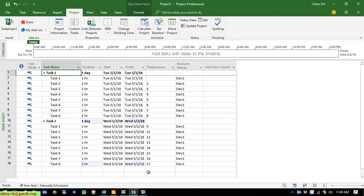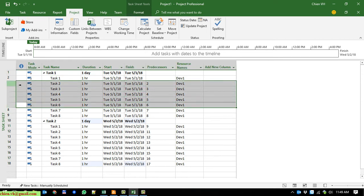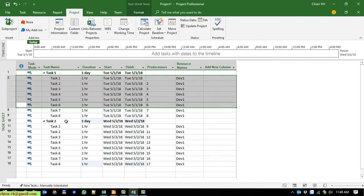Now if I want to change the hours for Task 1 and Task 2 — instead of using 8 hours per day, I want to use only 6 hours. So if I change it to 6 hours per day, tasks 1 through 6 should complete within one day, and tasks 7 and 8 should be moved to another day — 2 May instead of 1 May.